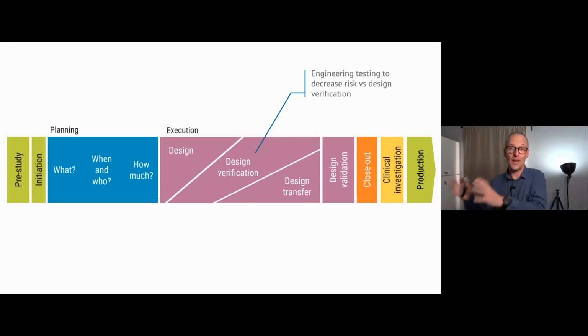And then you do your design verification later on, which is the more formalized verification that will go into the DHF, that will be under scrutiny from notified bodies or the FDA, and you will be happy to show it to them. But the engineering testing you can play around with in almost any way you like, as long as you keep it outside and clearly define the purpose. Now, if you do that, you can avoid those 17 weeks that I brought up before. And many project managers are neglecting that.